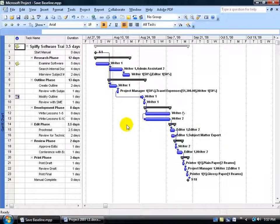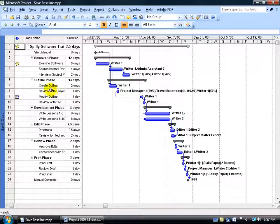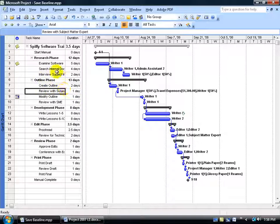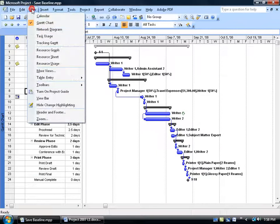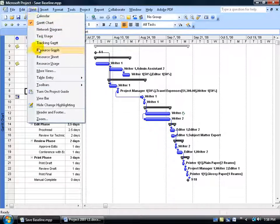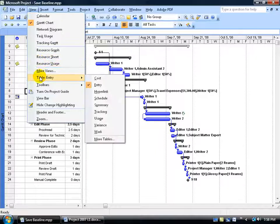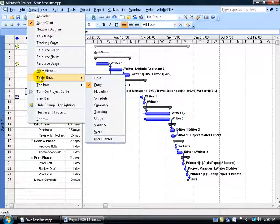This is going to be a teaser for the Level 2 training videos. But I'm going to stay in the Gantt chart and what I'm going to do is I'm going to change the table here from the Entry table where I enter in my task to the Cost table. You can do that by coming up here, clicking on the View menu, going down to Table Entry, and again any view you go to, the default is going to be Entry.